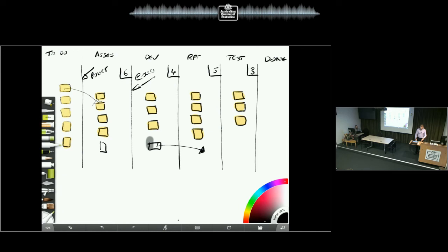The to-do column here, going briefly into visualization, what may happen is you may have a product owner who says, hey, this has just come up. It's a production failure. Sorry, let's color it in red. That didn't work, did it? There you go, that one there. And put a star in it, and then maybe you have a special lane. This is playing around with a system, and you may have a WIP limit for that lane that you can take one item that goes through and breaches the rules. It's like a clearway. Like in former Soviet Union, there's ZIL lanes for all of the government cars to go through. So you could have that as a ZIL lane. So that's something that we sometimes do.